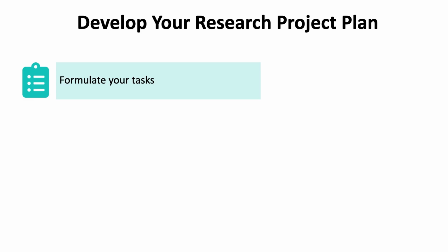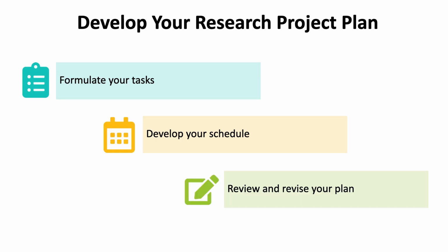The project will need to be broken down into discrete tasks, and each task briefly described in writing. Finally, the tasks need to be arranged in a schedule. Key milestones should be identified, including when the deliverables are due. Once the tasks are specified and the schedule has been laid out, it may become obvious that the project is too ambitious and there are insufficient working hours and scheduled time to accomplish the project at an acceptably low risk. Often the plan can be scoped down, but if not, now is the time to switch to another, less optimistic project.